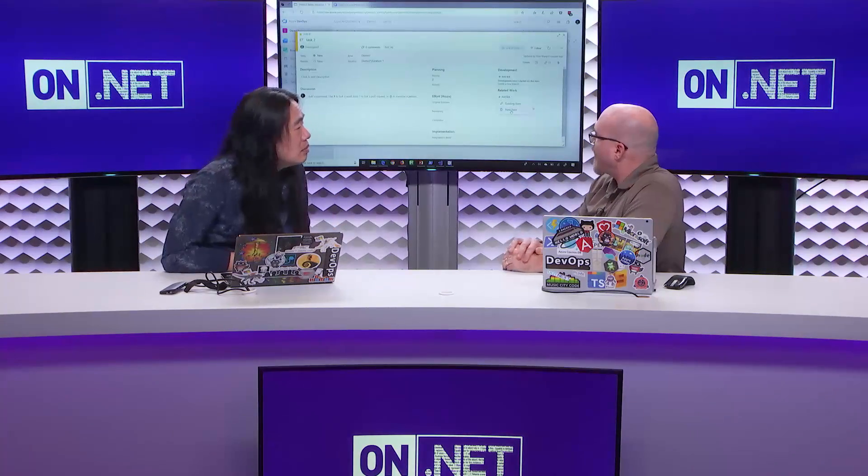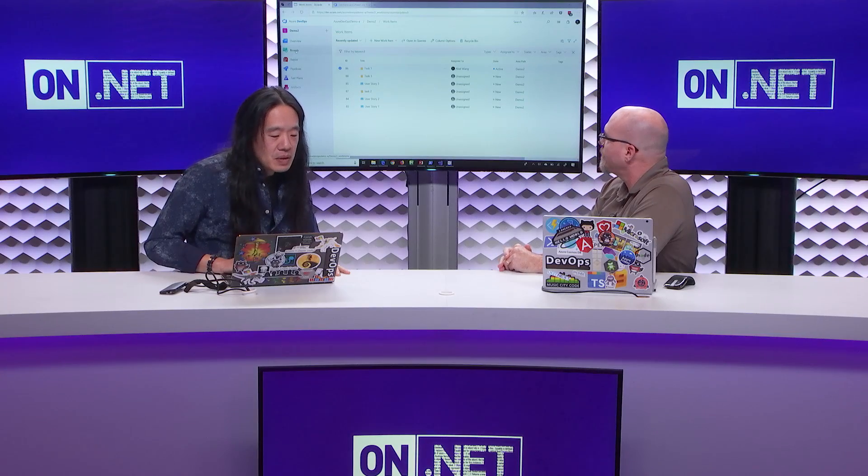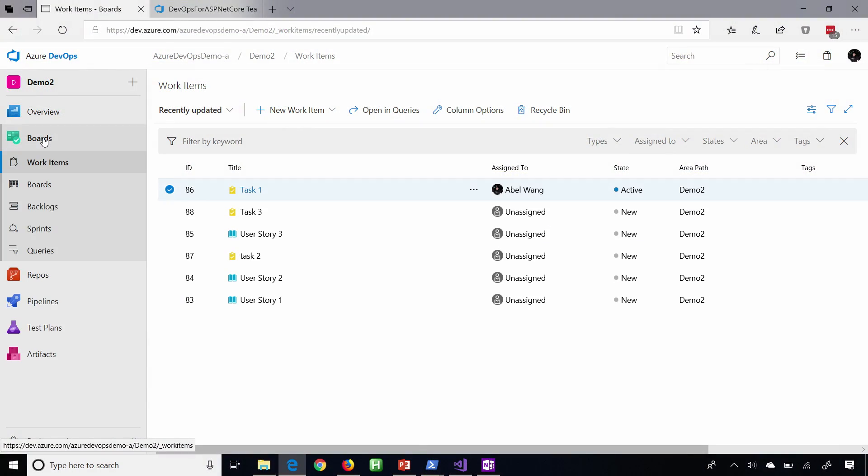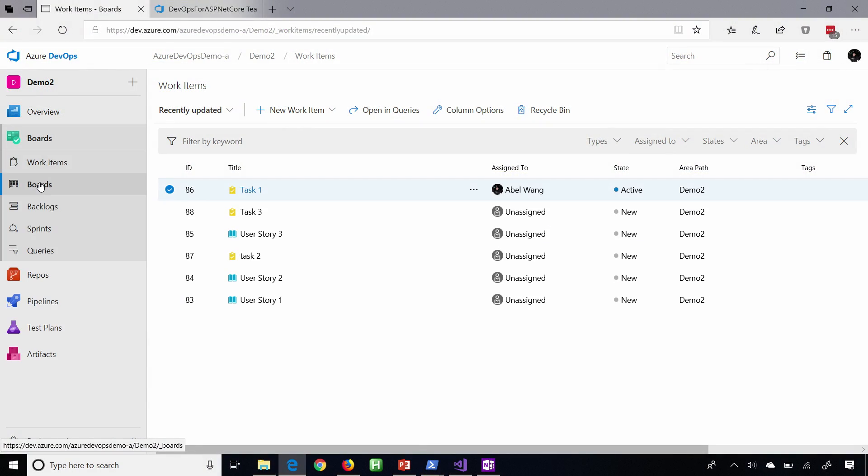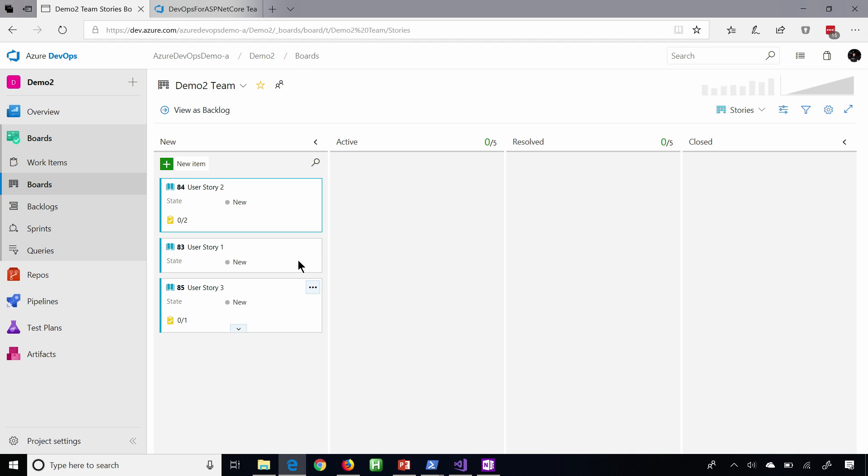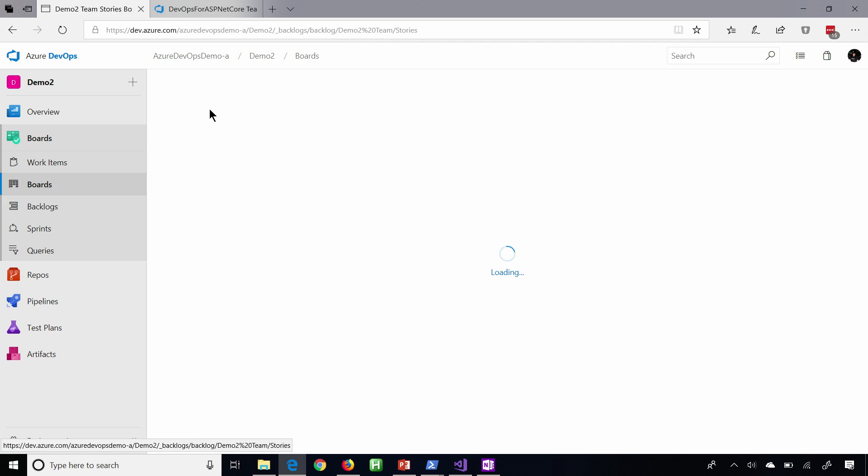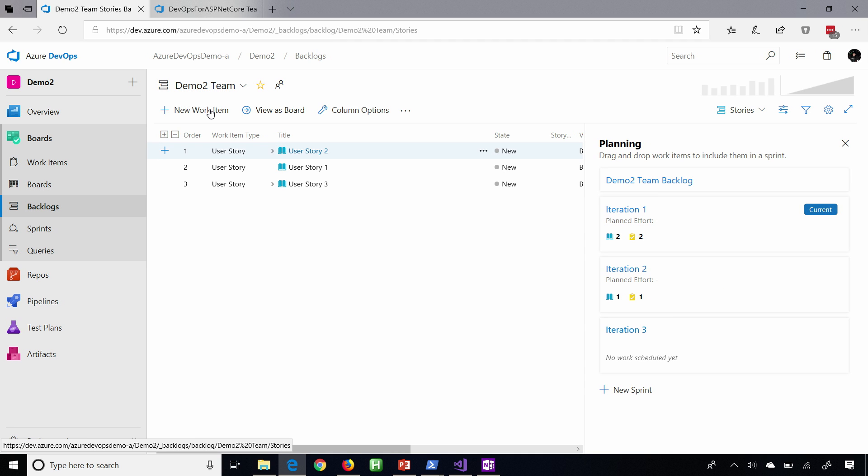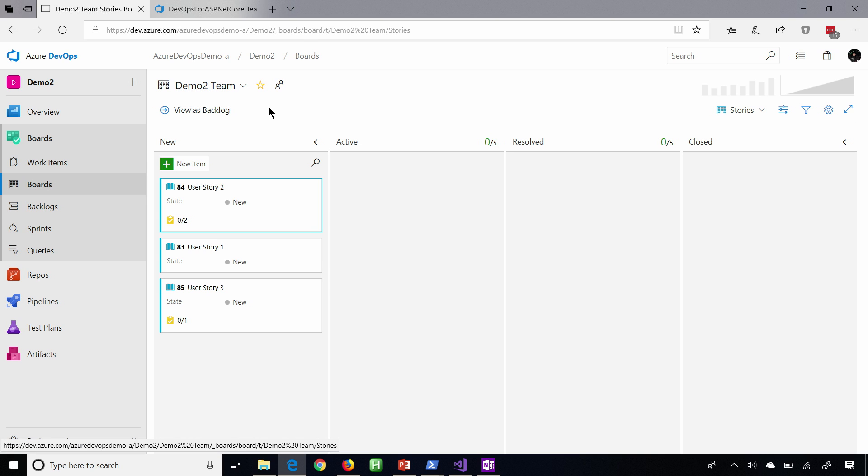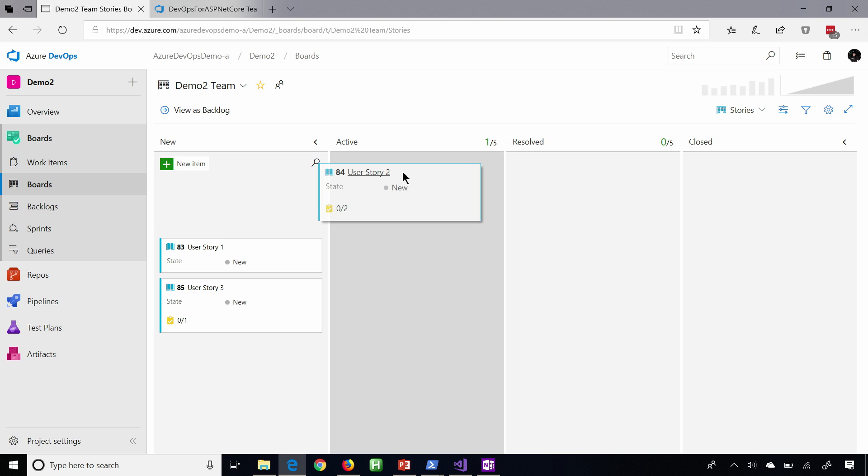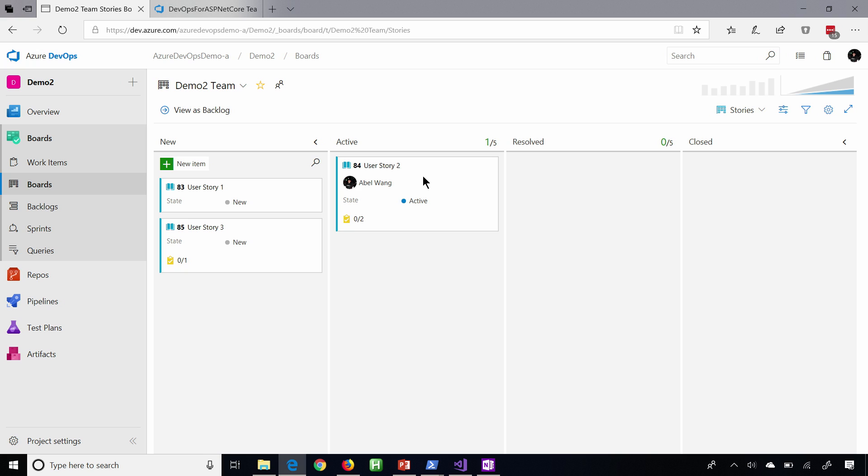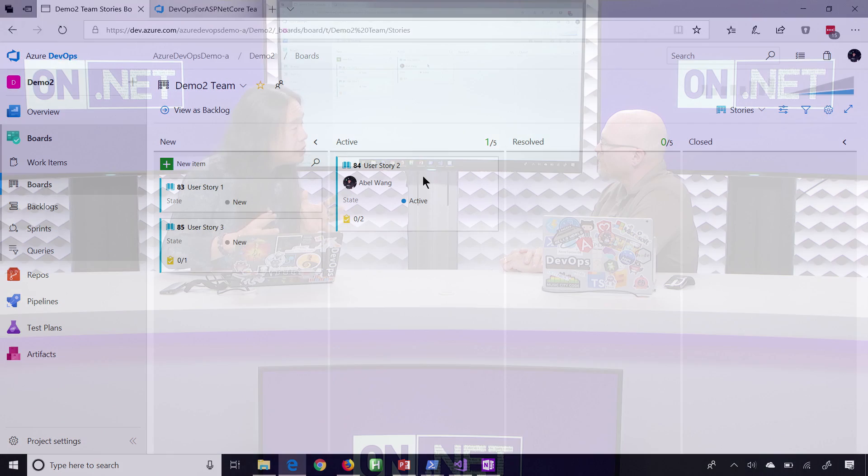So how much flexibility do we have with this board? I know some teams may like the statuses out of the box that goes left to right to close. So I may want a preliminary step or I noticed you did some custom swim lanes earlier. Yeah. So let me go ahead and jump over to the boards again. So this is our backlog, right? As soon as this refreshes. I'm going to jump into this is the boards view. Okay. Right. So before we were looking at something as a backlog. It's just an ordered list. Not very good at tracking your work. But if you go to the boards, that's when you can start seeing everything in swim lanes, columns, etc. where you can start dragging your work across. Right. So this is the Kanban board style, right? Yes. This is a Kanban board. Now this board here is fully customizable where you can make it look however you want to. So you can add your own columns. You can add your own swim lanes. You can add rules to say if it's a priority one, you can change the color of the work item as well. You can add whatever field you want onto the card, right? Fully customizable.